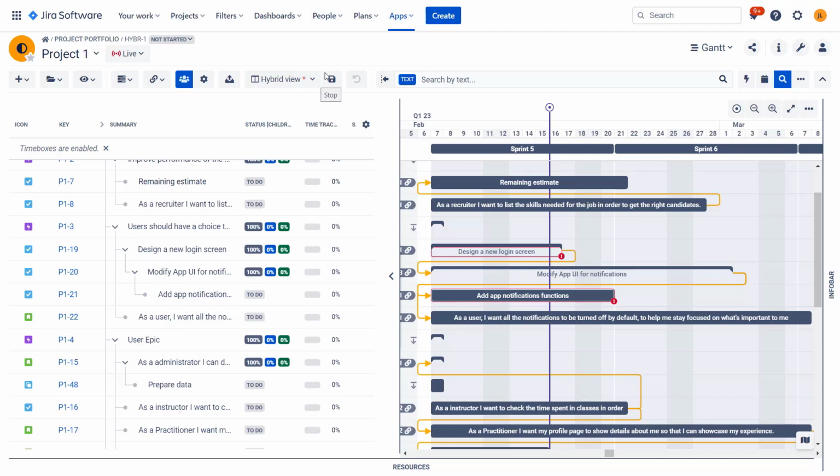So how to compare those 2 tools? If you're starting a project completely from fresh and you need a very deep hierarchy, I think that Advanced Roadmaps is more intuitive. That being said, if you already have issues, you have some hierarchy, but you are not using any project management tool, you want to start using it, BigPicture will be more accommodating out of the box. It will help you to reflect this hierarchy in the tool easier.